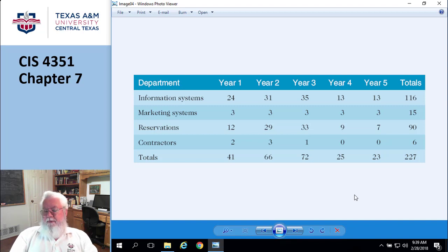And of course, you could kind of look at this and say, okay, so I would be best served if my preliminary estimates were actually a little high. Now, you don't want to overdo that, because if you made your estimate too high, then they may not approve your project. They may move on to one that costs less. But once you kind of got that mindset, you need to be able to set yourself up so that your management staff has the same level of expectation as you do. Okay, that's tough. On page 275, they talk about how to develop a cost estimate.